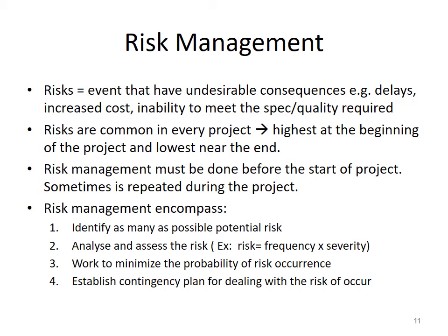Risk management is necessary for every project. So risk, what are risks? Risks are events that have undesirable consequences. For example, delays, increased costs, inability to meet the specification required, the quality required. So risks are common in every project, and it is usually highest at the beginning of the project and lowest toward the end of the project.